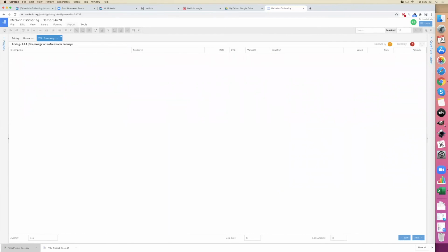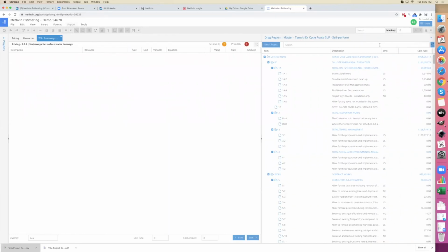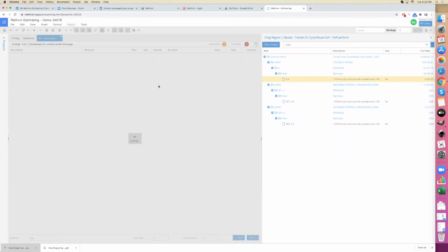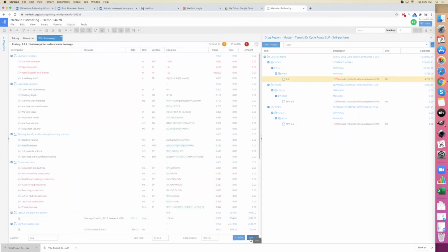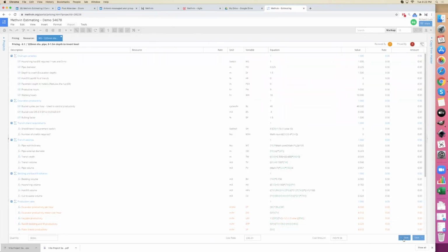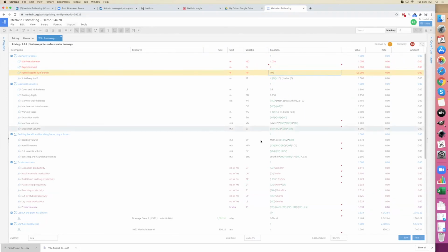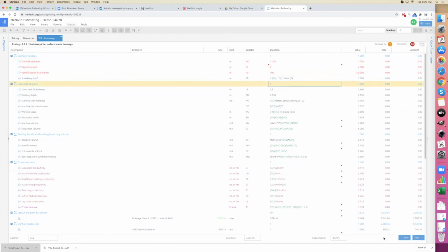And the idea is you'll do a manhole. I know I don't have one here, but let's just say it was a 1050 manhole. Hopefully you've got one priced there and you drag and drop it in, and you jump onto the next line item. Let's go back to that one. So we've dragged that in. What you'd do is go through and make changes to these variables that you set up to suit the new job. That could be things like it's now no longer a 1.05 diameter but 1.2, and let's say the depth is now 2 meters. You'll see the pricing just changes as we make these changes, and then you can save it on to the next line item.